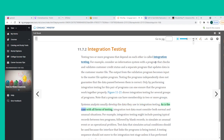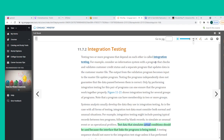As with all forms of testing, integration test data must consider both normal and unusual situations. For example, integration testing might include passing typical records between two programs, followed by blank records to simulate an unusual event or operational problem. Test data that simulates actual conditions should be used because the interface linking the programs is being tested. A testing sequence should not move to the integration test stage unless it has performed properly in all unit tests.